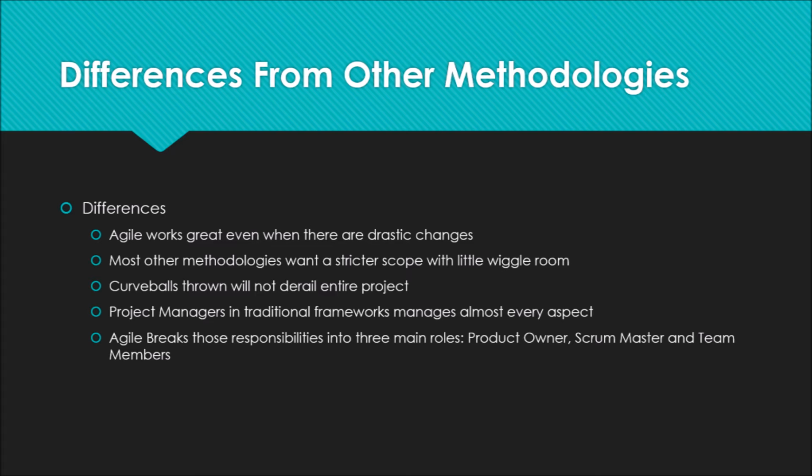Now, more traditional waterfall project management leaves the project manager balancing the scope, cost, quality, personnel, reporting, risk, changes to the project, etc. Agile divides these into three main roles. So, first up, the product owner handles setting project goals. Makes sense, right? Handling the trade off of schedule versus scope, adapting to changing project requirements, and setting priorities for product features.